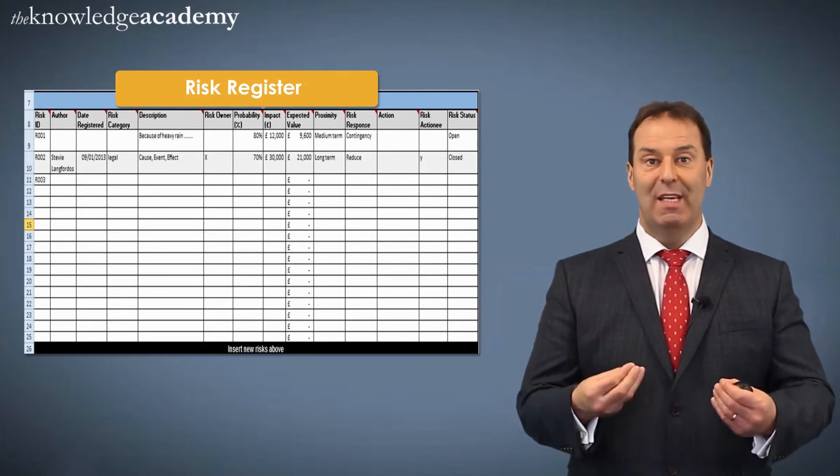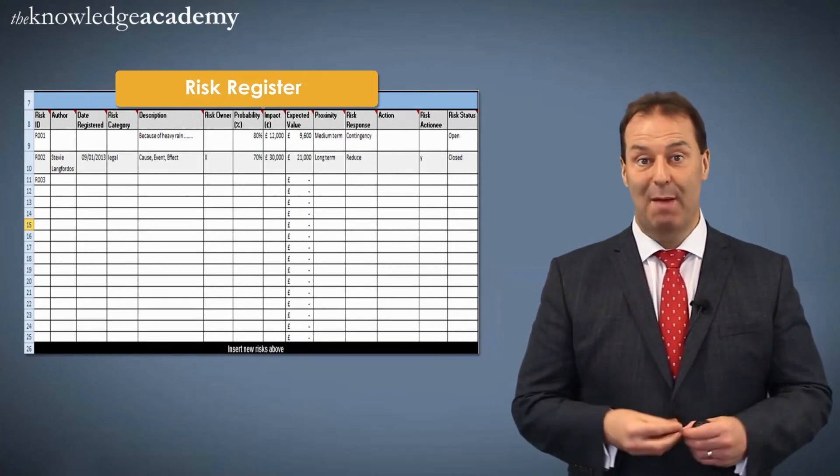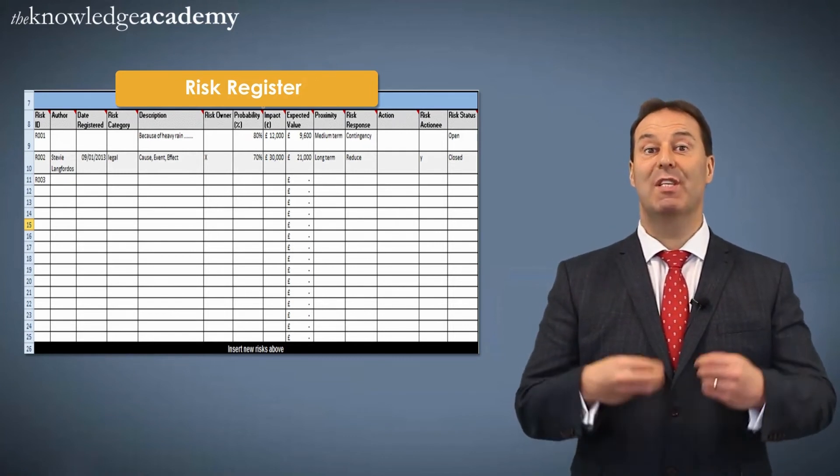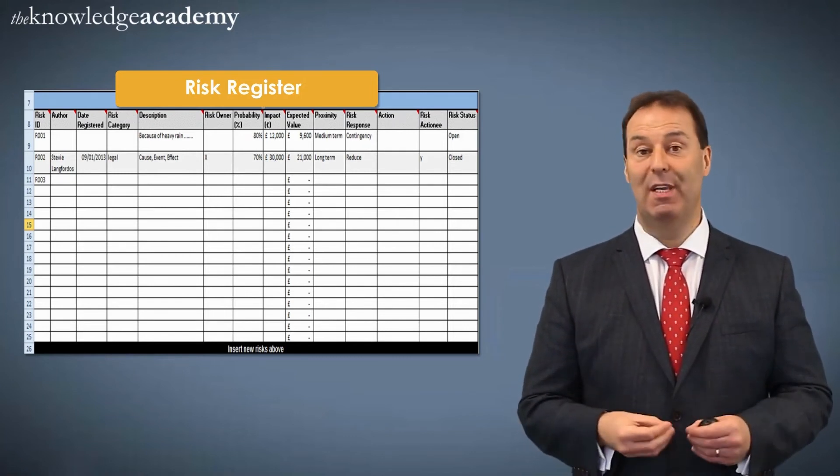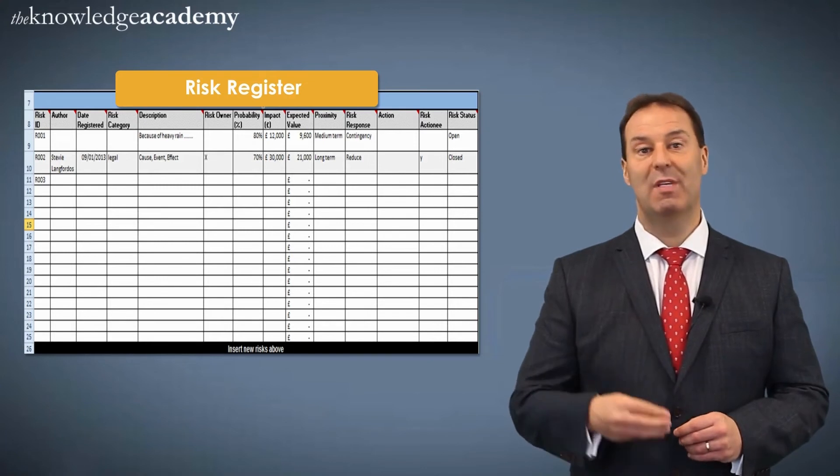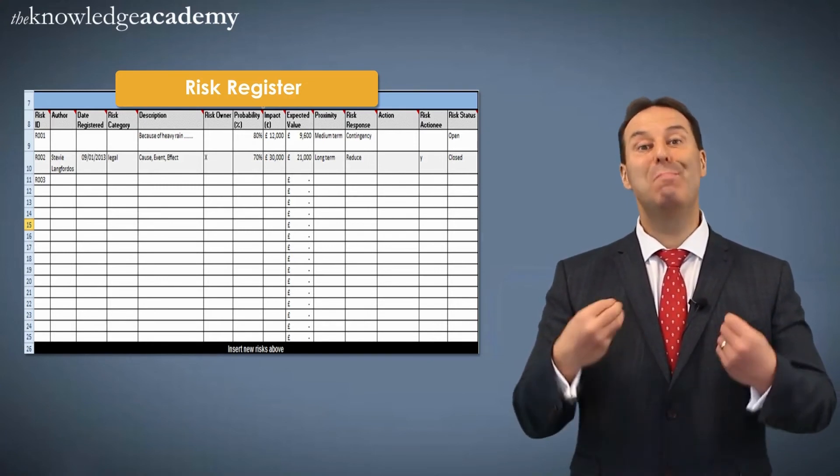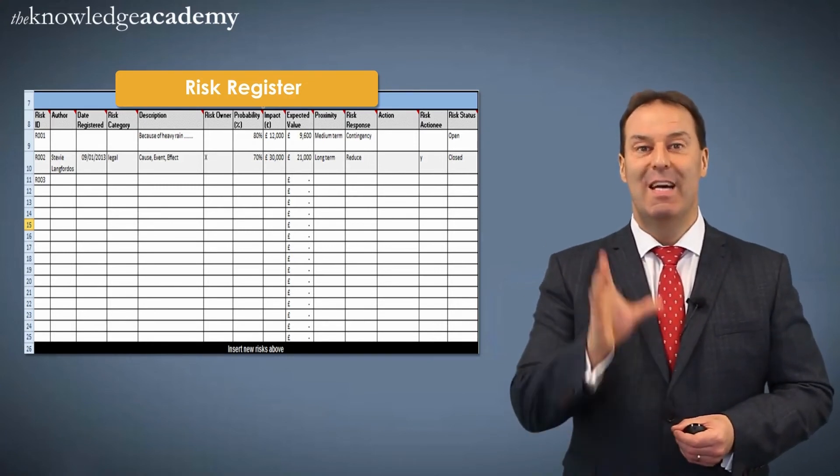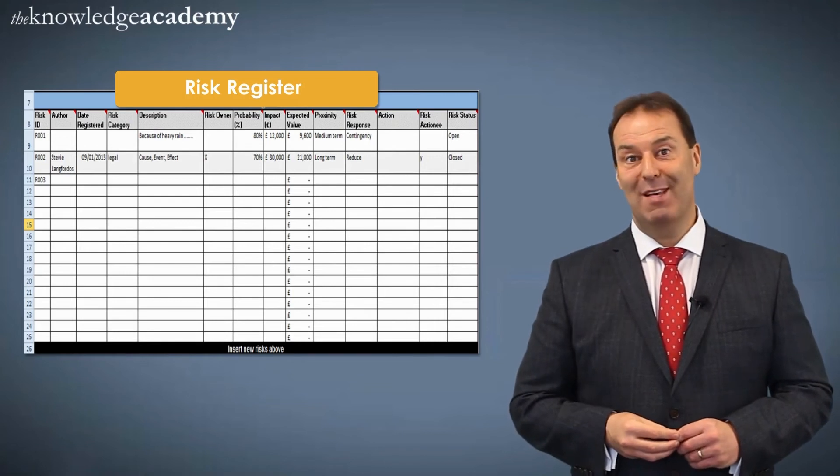It's a regularly updated and often referred to as dynamic document. Any risk that's added to this never ever leaves it. It will always permanently stay on there. So once you've completed the risk, don't delete it. Keep it there so you can reference back to it.